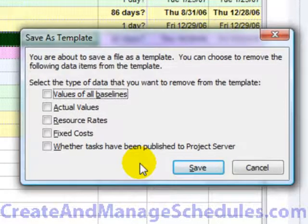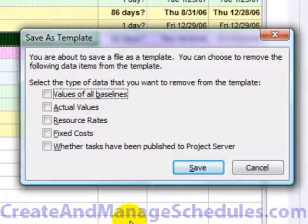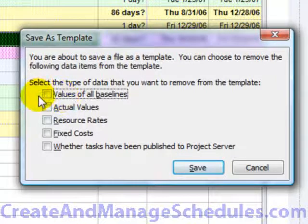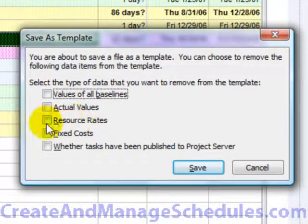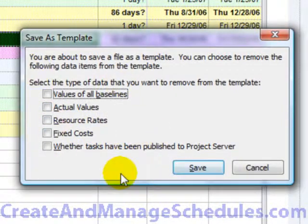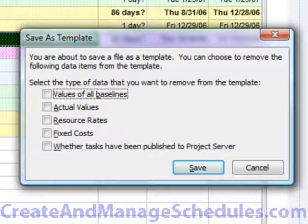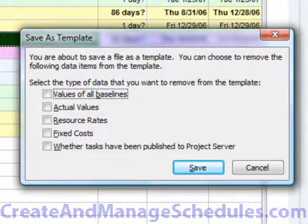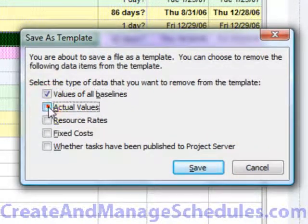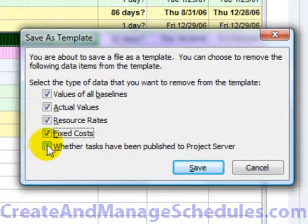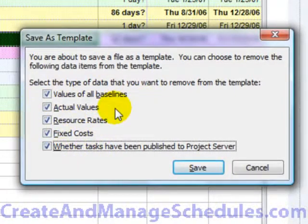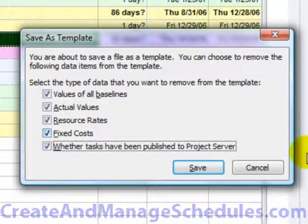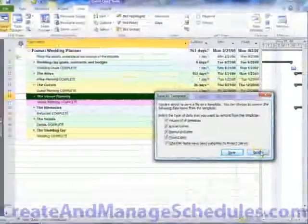And after you click on Save, you'll see here that the Save As template prompts you. You can choose to exclude certain elements like you might want to take out the values of all baselines, actual values, resource dates, etc. You can choose what you want and then when you're done you click on Save. It's definitely recommended that you exclude all of these values since most project schedules will have unique baselines and actual values. So you really won't need to take this information into a new project schedule. But there are cases where you might need to and that's why this option is here.